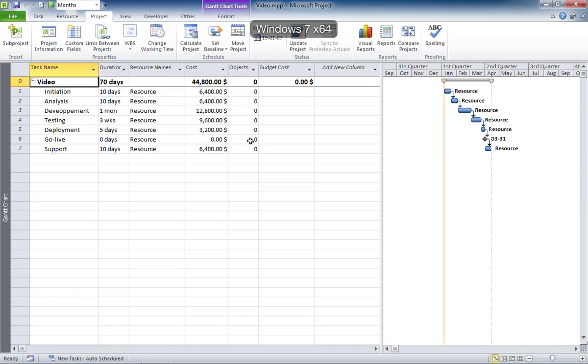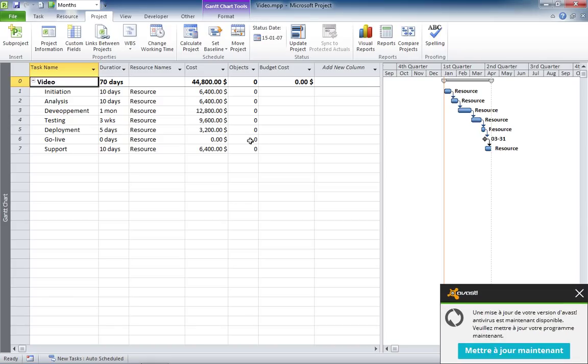In many organizations, there is a requirement to identify and separate the OPEX costs from the CAPEX. More than that, an organization might impose two separate budgets on your project that you need to monitor separately, the OPEX budget and the CAPEX budget. Here's how to proceed on this with Microsoft Project 2010.